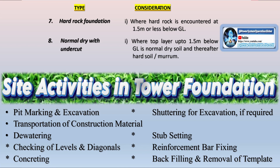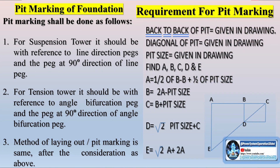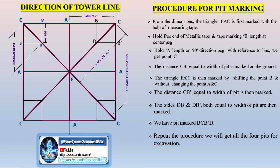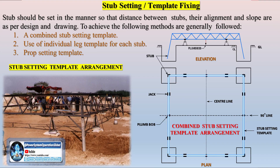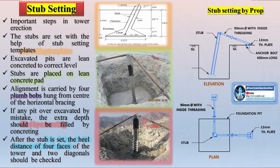The timing of the detailed survey is important because it allows for early identification of potential challenges that could delay construction or increase costs. If significant issues are discovered — such as unstable soil, unanticipated land use changes, or unexpected environmental obstacles — the route may need to be adjusted before finalizing the design. Once the detailed survey is complete and the data has been analyzed, the project can move on to soil investigation and foundation design. The soil investigation phase occurs immediately after the detailed survey and is crucial for ensuring that the transmission line towers are properly supported by stable and reliable foundations.